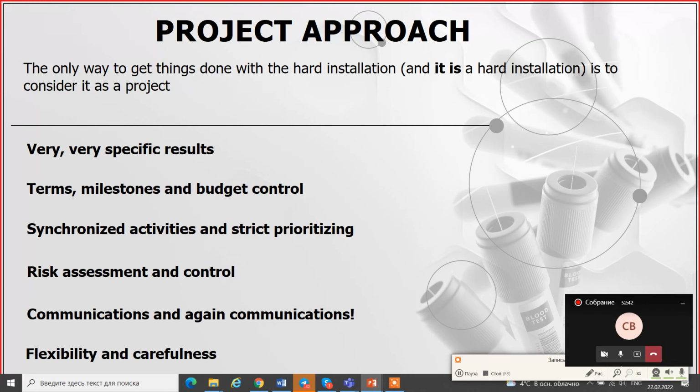First of all, you can combine the project briefing of what it is for. There are a lot of forms. Project charter, it means. It can be only one or two pages in A4 format, and you can very, very briefly and very, very precisely compound the desired effects, the scope of the project, the team of the project, and what the project is at this initial planning stage.